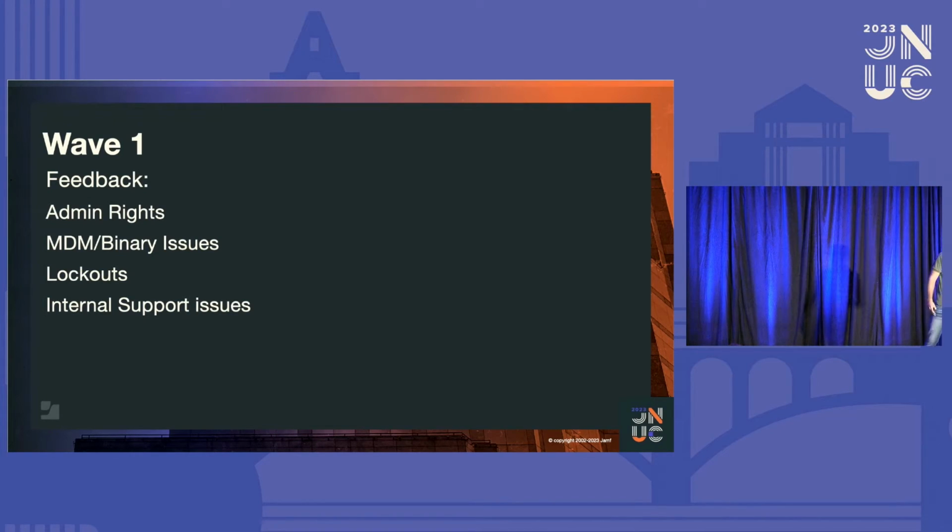A couple other things to note. Our internal support team was presenting a lot of feedback to us about this rollout. While it's easy to blame the support team for lack of good troubleshooting and support on the rollout, we failed to give them proper direction and support for the deployment. The support team was also fielding constant requests on the Microsoft migration and other large projects as well as the traditional support issues. And this is where our lesson 1 comes out.